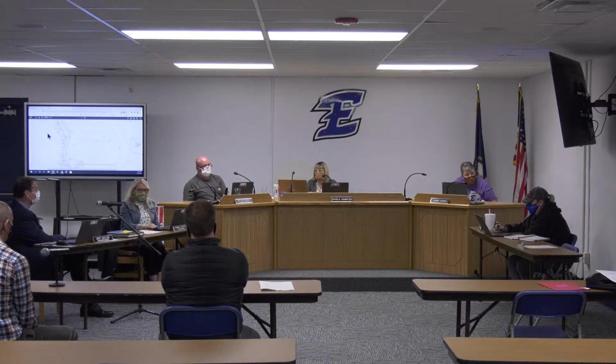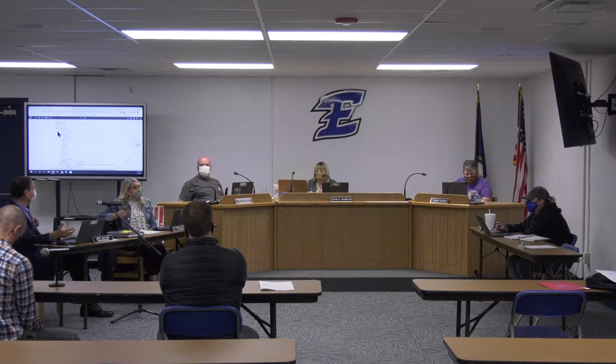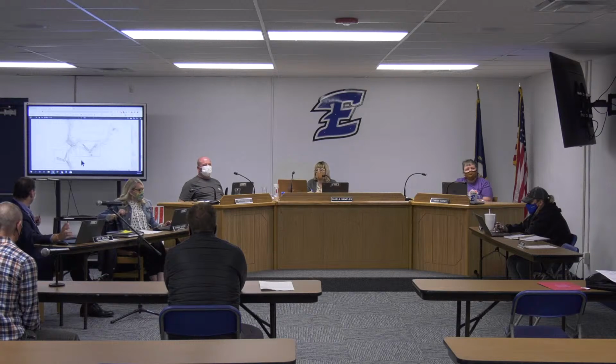But everybody know, there were some cuts made to this project. We talked about that two months ago, and there were cuts made because when Ross Tarrant and Codell sat down for the second time and looked at the rising cost of construction, they felt like we were a little bit over $1 million above project cost. And the one thing that KDE told us, you cannot increase the cost of this project and slant it more towards athletics. So we have to be very careful about how we move forward here, because we've got to get a final approval too. Just because we bid it and get bids back, we have to submit those contracts to KDE. And if they decide, hey, you all didn't honor the agreement we had, they'll stall it. We'll be right there, we'll be fighting again. So I don't want to get in that predicament.